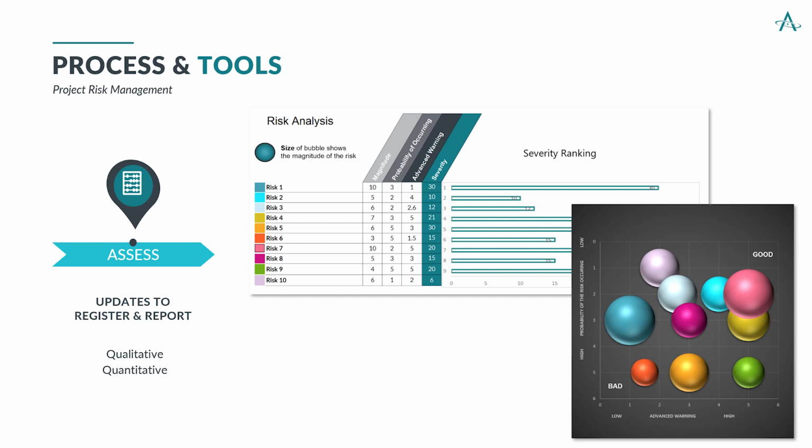As I mentioned before, not all risks will equally decrease value. Some risks will decrease value stronger than others. We need an objective method to rank them against one another. And why? Because this takes the emotion out of the equation, and we just focus on realistic, objective measurements. As much as we don't want to say that's going to happen, if the probability is high and the impact is high, we better address that.